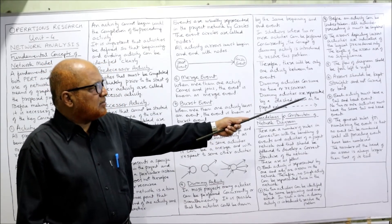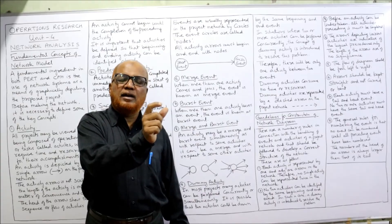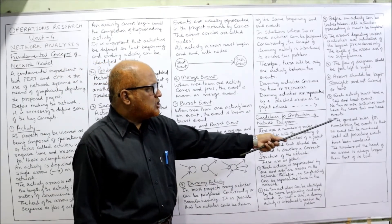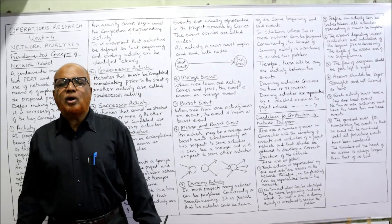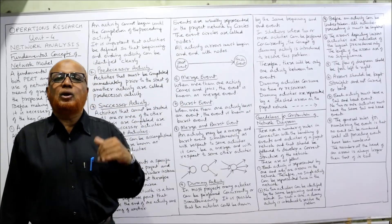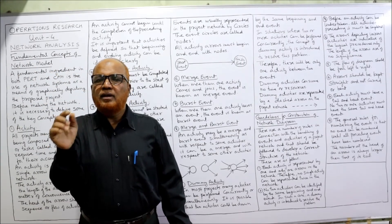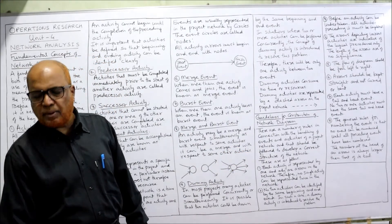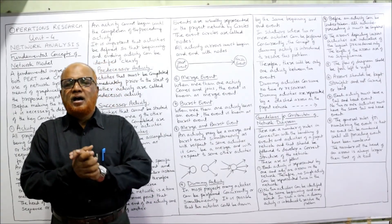Fifth, the flow diagram should always go from left to right — never top to bottom or right to left. Sixth, arrows should be kept straight and not bent or curved. Seventh, each activity must have a tail event and a head event — one beginning event and one ending event for every activity. The general rule for numbering is that no event can be numbered until all preceding events have been numbered, flowing left to right, with the head event number always greater than the tail event number.